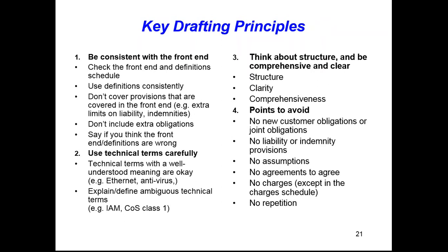And by these I mean the scope of work, the statement of requirements, the charges schedule, even things like these are our company's health and safety or IT policies that we need you to comply with. And so there's basically 4 things which really are important. You have to be careful that what you write in the back end of the document is consistent with the legal front end of the document. So, you know, if you are defining things like the working week, you have to make sure the lawyers haven't defined the working week in a different way.